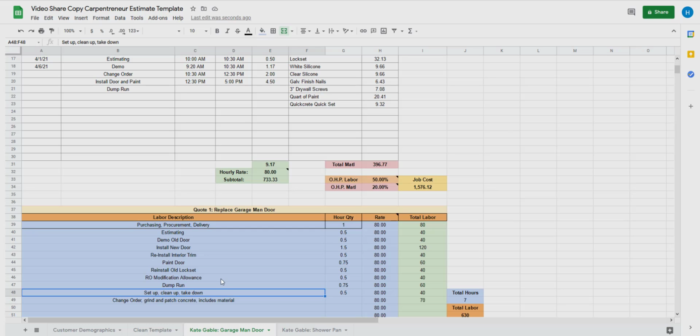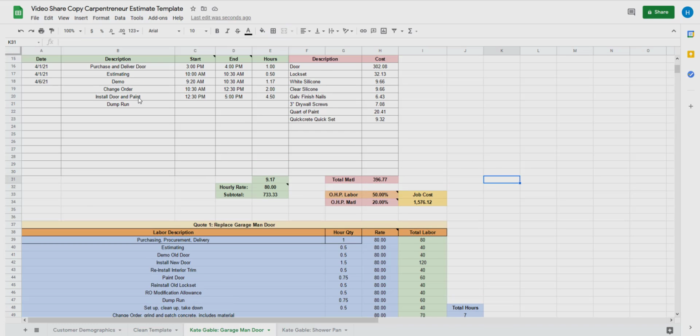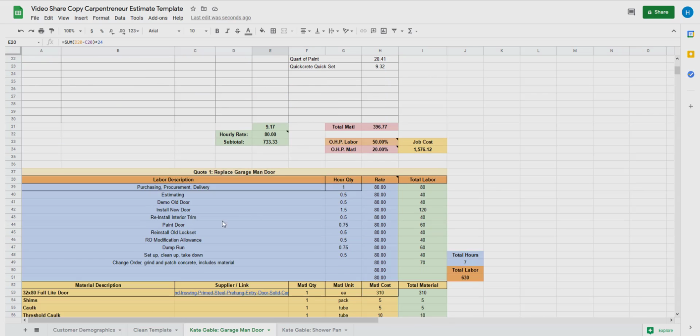So I had estimated about 4.25 hours to do all of that, and it took me 4.5 hours. So I was really close there. Where I feel like I really went wrong here was on painting the door. Painting the door took, I want to say, like an hour and a half.